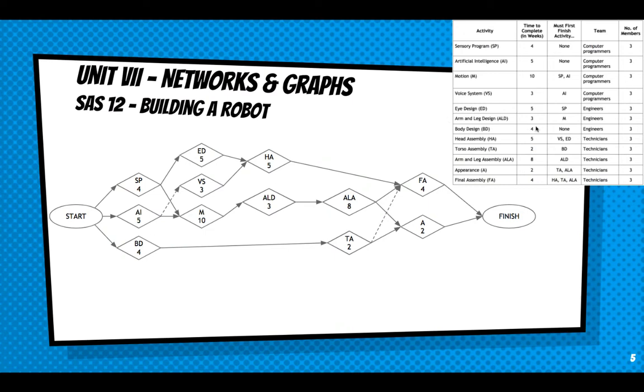Artificial intelligence is the same way. And so is, down here a little bit further, body design. No activity. So they all come off here. All right. Voice systems must require AI to be completed. Okay? So AI has to be completed for voice systems to work.